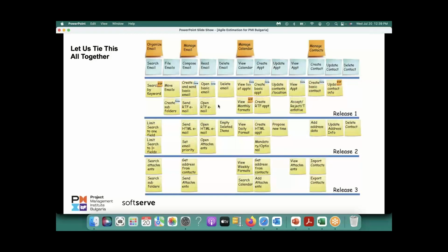If you did 15, that's okay. If you finished all of them and picked a couple from there, that's also okay, right? So what we are saying, our scope is variable, and this is something that you need to understand. When you do agile planning, you are not coming up with the dates. Your dates are fixed. You are coming up with what you are going to deliver by that date, and that's the scope flexibility. So it's very important to understand.